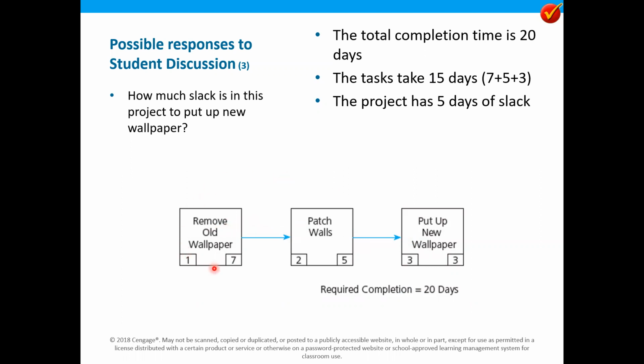So it means that the slack on activities in a path is basically shared slack. For example, if there is a total slack of, say, 5 days, one of the activities can use maybe 3 days of slack, another activity may use 2 days of slack, and then the third activity will not be left with any slack. So the concept of slack in an activity is basically the concept of shared slack in the path.